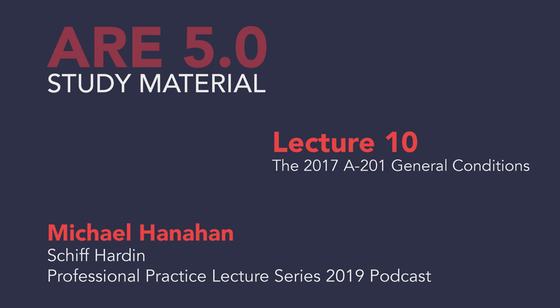These would be coordinated with the contractor's construction schedule. That would make sense. And allow the architect reasonable time to review the submittals. So you can't just give the architect three bricks and say, here are the three we think match, tell me by today which ones I go out and order, because if not, it's going to be late. You've got to give everybody reasonable time.